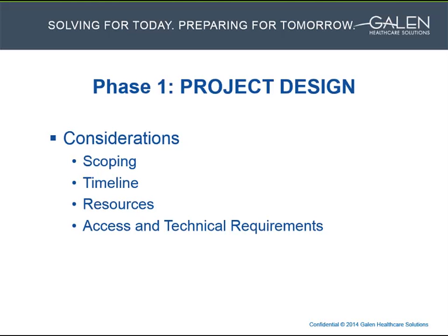The client has a conversion team as described, but they will also bring other resources in during the conversion that they will have to make plans for. For example, the last round of testing uses people that will actually be using the target system after the conversion. The availability for these testers needs to be planned for at the beginning of the project.